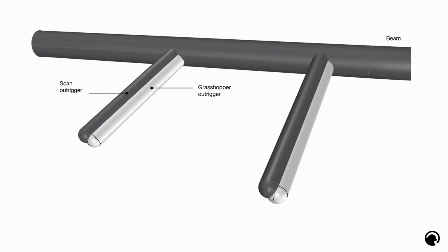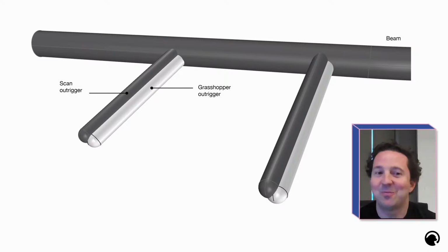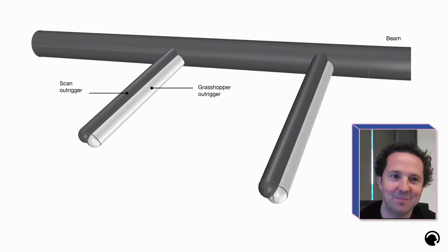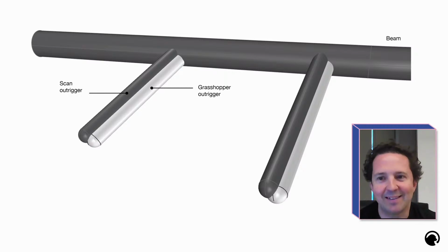So we did a 3D scan, and what was built was way out from the BIM model. And if you're doing manufacturing, you're at millimeter tolerances. And especially if it's non-orthogonal, that throws everything out.